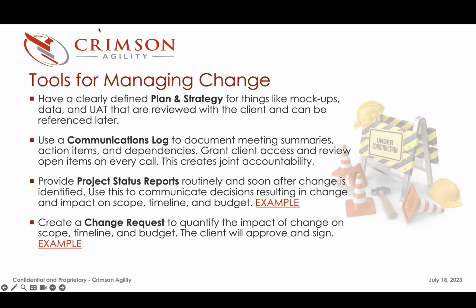I had also just, it's very common, especially on front-end scoping for tasks that are integrations and third party. Those are things that we have limited knowledge on. We're either relying on information from the third party or, like, extension installations. Since we're going into something that we are unaware of, whether it's timeline or budget, it's important to call that out as risk time. As far as the buffer goes, I always call it risk time, that there is potential for that because we don't know what we don't know.